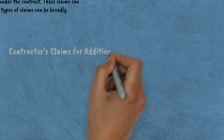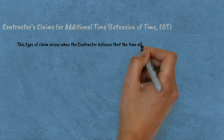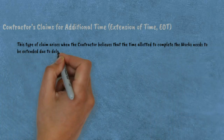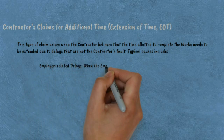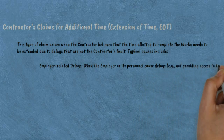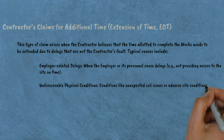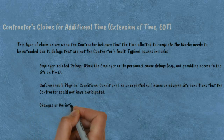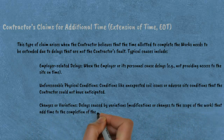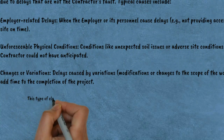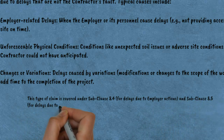First, contractor's claims for additional time — Extension of Time (EOT). This type of claim arises when the contractor believes that the time allotted to complete the works needs to be extended due to delays that are not the contractor's fault. Typical causes include: employer-related delays, where the employer or its personnel caused delays such as not providing access to the site on time; unforeseeable physical conditions like unexpected soil issues or adverse site conditions; and changes or variations — delays caused by modifications or changes to the scope of work. These claims are covered under Sub-clause 8.4 for delays due to employer actions, and Sub-clause 8.5 for delays due to unforeseen circumstances.